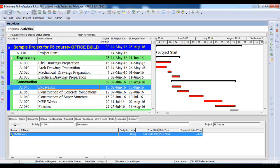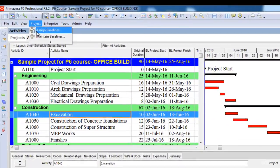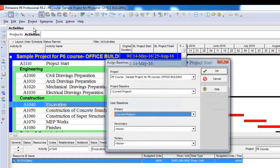In order to assign it to my project I will again go to the Projects option, then click Assign Baseline.